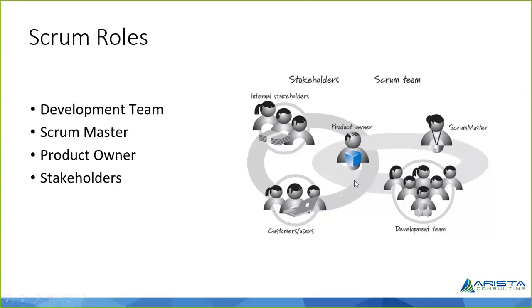If the product owner is apprehensive about that, then the Scrum Master really becomes a master, wherein he would flatly deny, saying that the development team is not going to take any instructions from anyone from the stakeholder community except you. And those are not basically instructions, but those are the requirements which are flowing in for the development.